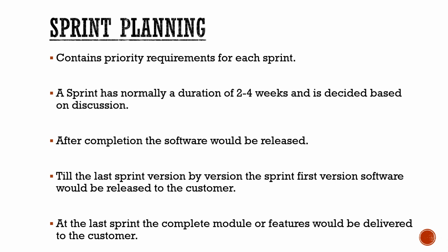Whatever software is prepared, that version is released to the customer, so he can have an overview of the software. Based on that he can give comments, like this acceptance criteria or this requirement is not met. That will be shared by the customer, and then we will take it in the next sprint activity. So each sprint the software will be delivered to the customer.